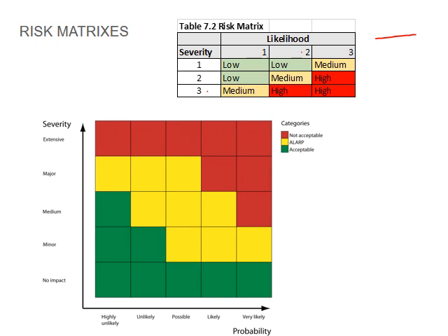So instead of just putting up danger tapes, you may put up barricades. So in this instance, your risk will be highlighted as a high. It might even be a 3, which will also highlight it as a high, but because it is quite a severe incident, even if the likelihood of it is quite low, you will still sit with a medium-high risk. So that's the thought process that one goes through in identifying the risk priorities on site.